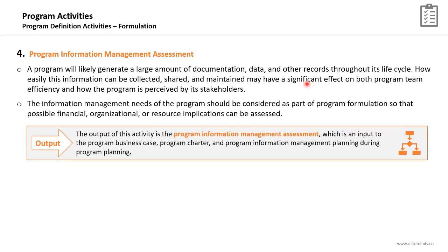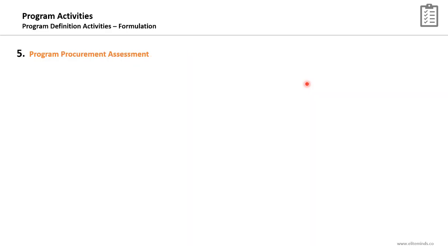The output of this supporting activity will be the Program Information Management Assessment that will be an input to the program business case, program charter, and program information management planning during the program planning subphase.